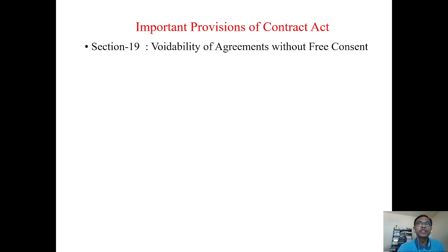Now, when we speak of misrepresentation, you can just have an idea. In a construction contract, in the bid documents, there will be data supplied, say a soil profile or some sort of borewell data or some site data. Some will be provided, but they reserve that. Though this data or these investigation reports are provided, they are only provided for information. The bidders are required to do their own investigations and ascertain the authenticity of the site particulars. Means what? They are providing the information, so it should not be construed as a misrepresentation of the fact.